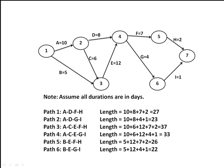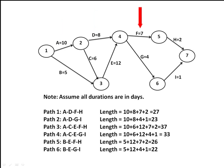Let's look at some of the actual paths of the workflow. Path 1 goes from node 1, the start of the project, through nodes 2, 4, and 5, and then to node 7, the end of the project. The actual work activities are A, D, F, and H, with the path having a length of 27 days.